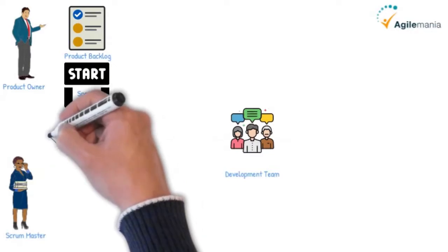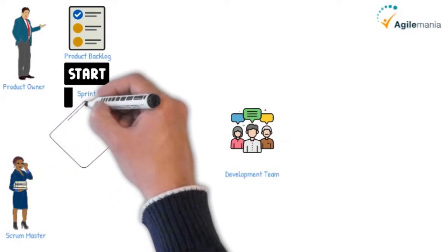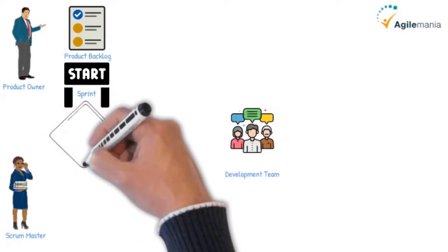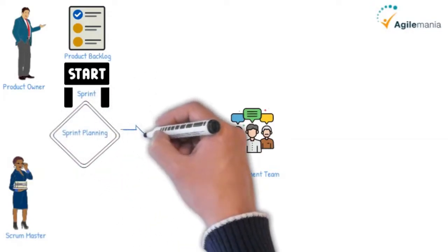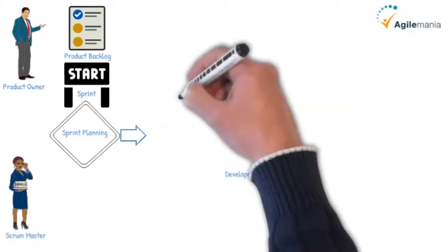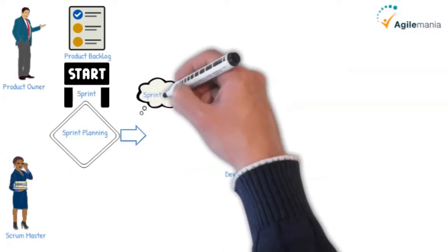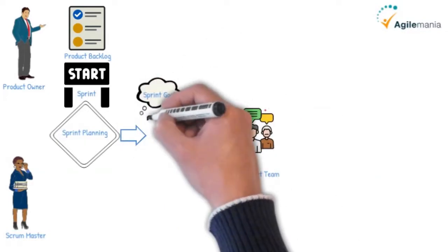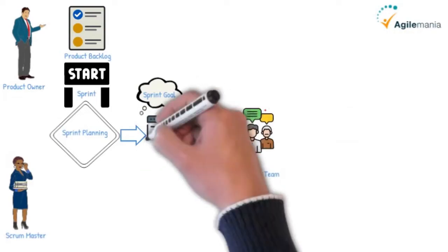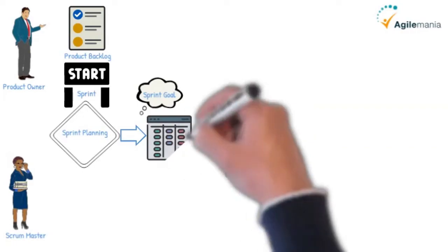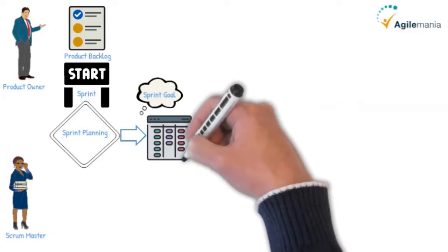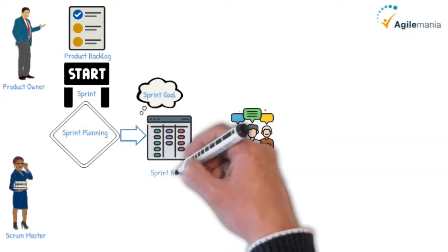The sprint planning is an event for the Scrum team to define a goal for a sprint and for the development team to forecast and plan work to meet the goal. The sprint goal is a specific goal for a sprint that helps the team stay focused. The sprint backlog is planned for the team to raise transparency at work. The development team adds forecasted items or stories to the sprint backlog in order to complete them within a sprint.